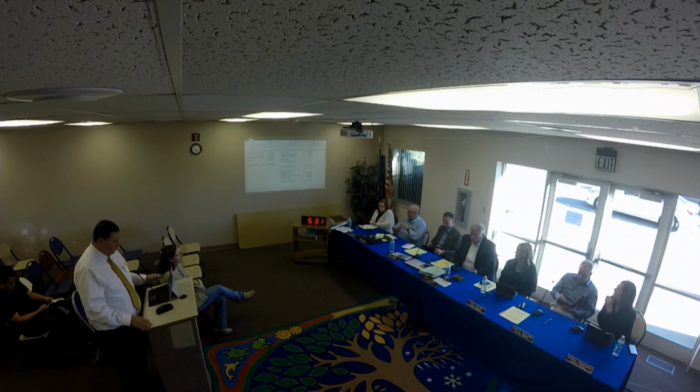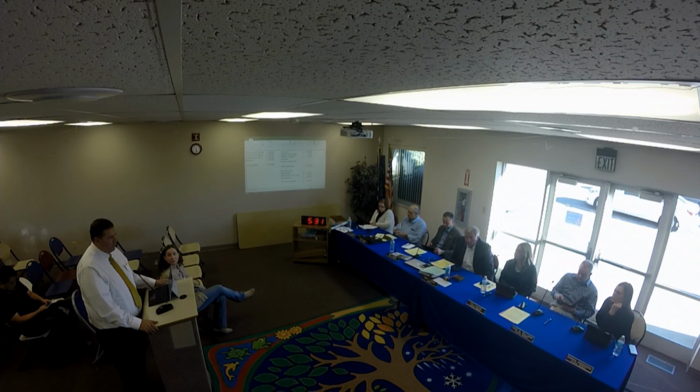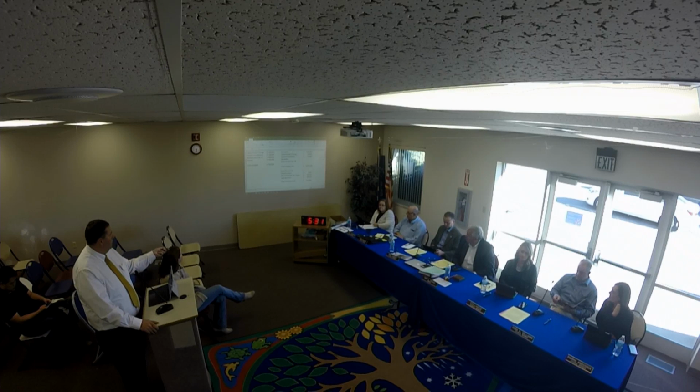So is that good? I think the roadway's been designed. I think the question now is just putting a fence on there. But I just think that if we commit to them now, while the construction is happening, with mobilization and materials already being there, the price isn't going to change much. Are these hard numbers? The first two are bid numbers. The park restroom right now, we're still finalizing the bid on that.